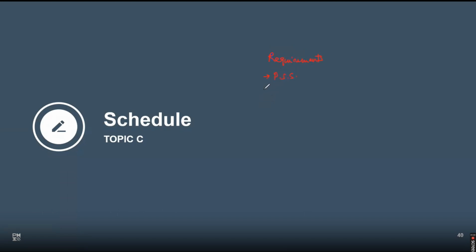Once the project scope statement was done, we did a WBS, which is work breakdown structure. So that has got all the deliverables at this lowest level, which is where we have acceptance criteria agreed, how the customer will come back and check and audit these things. My team will be aligned with that. Now, at this stage, this is the end of your scope.